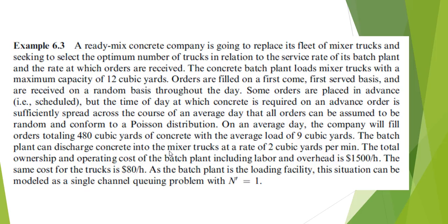You're going to have the number of trucks and how quickly they can arrive at that plant as compared to the service rate of the batch plant, how quickly the plant can fill up a truck with concrete so that it can go away. So you can have a lot of other steps, but this is a basic one. How many trucks? How quickly can the batch plant load the trucks?